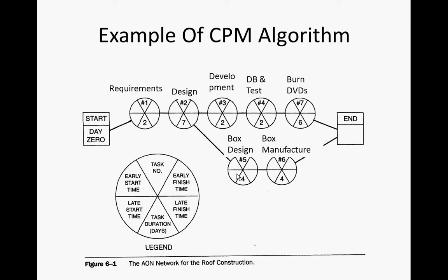Okay, so what is this telling us? This is an exercise we've just gone through, and at this point these are just numbers. But why are they interesting? Yes, there exists slack on the above path. So you'll notice that the earliest start time of this node and the latest start time are different. We have latitude as to when we are going to start this task. We could start it as late as 13 and still finish the whole project in time.